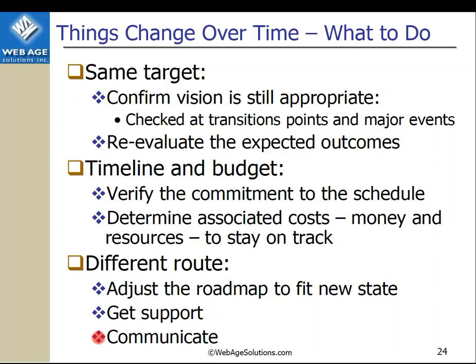By the way, another thing to caution you about: while I do want to have regular checks and updates to the roadmap, I don't want to overdo it. If you're constantly changing it, then you've got the opposite end of it, where people think, well, you keep changing your mind, so I'm not going to do anything, where it paralyzes people, or I'll just do my own thing, right? So there's a sweet spot. No changes and too many changes, both of those don't work. I want sufficient regular checks that make sense in event or transition architecture, where we can reconfirm or adjust what we're actually going to do.